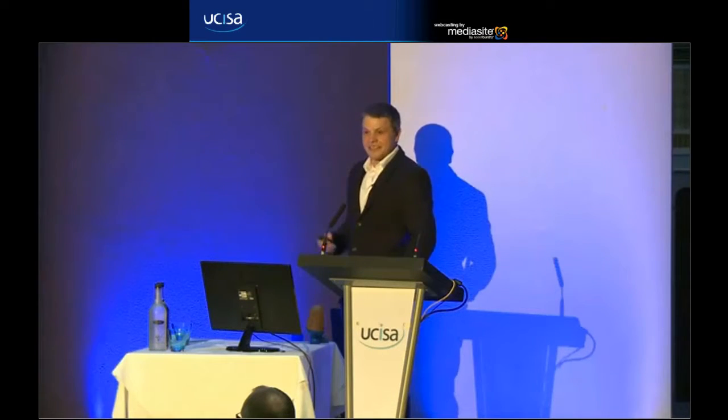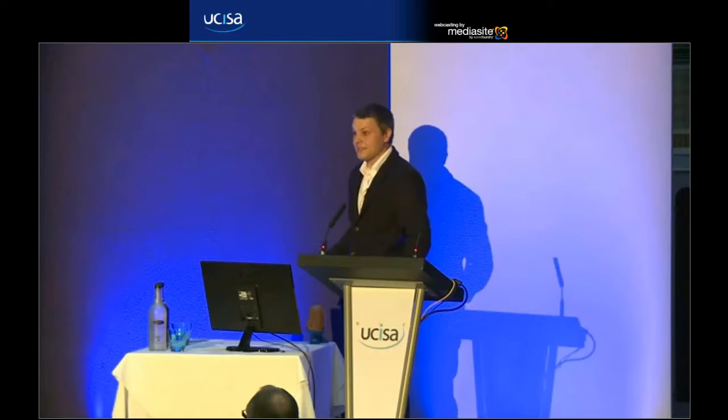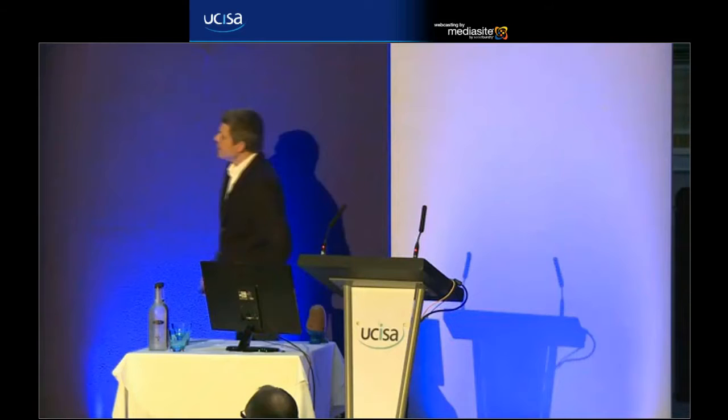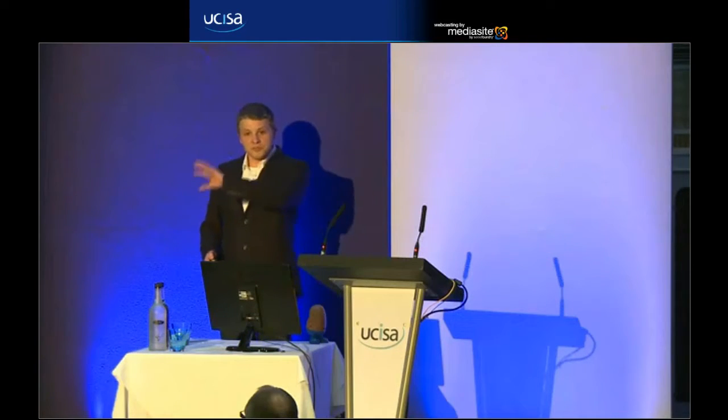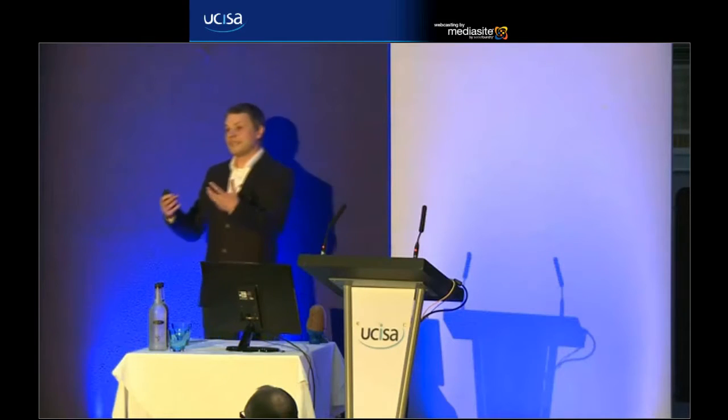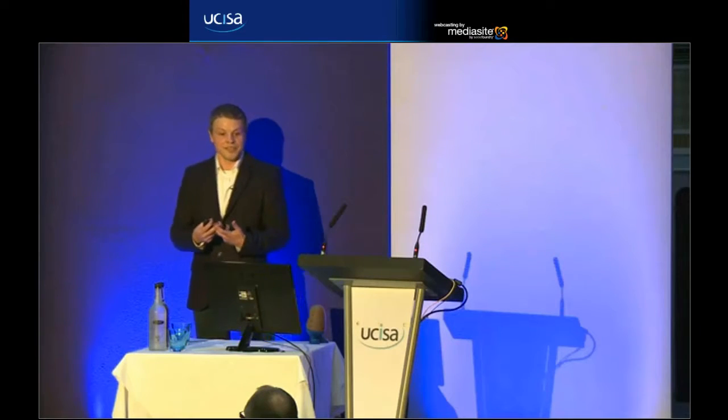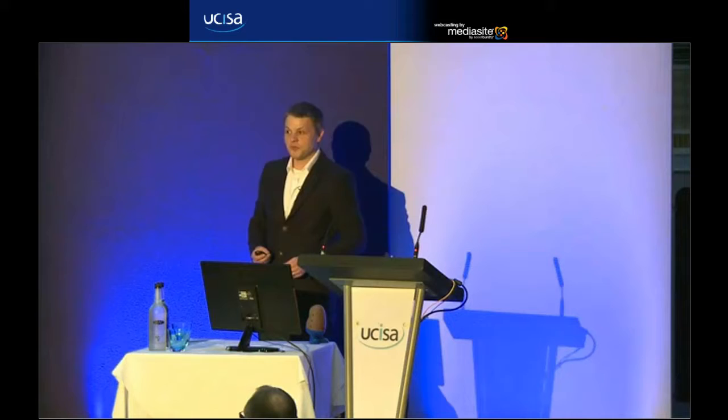And you see at the title there is Agile Poker. This is one of the ways that we actually estimate the different stories. So, how does that work? Well, all those numbers, we get printed onto cards. And I have heaps of packs of cards back at the office, which have the Fibonacci sequence printed on them like this. And all these packs of cards get given to our developers.